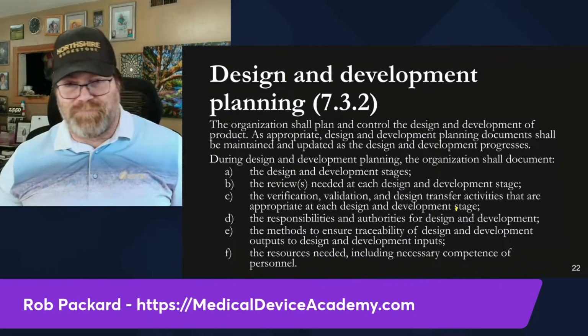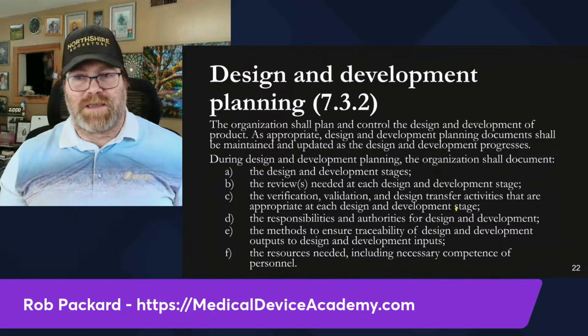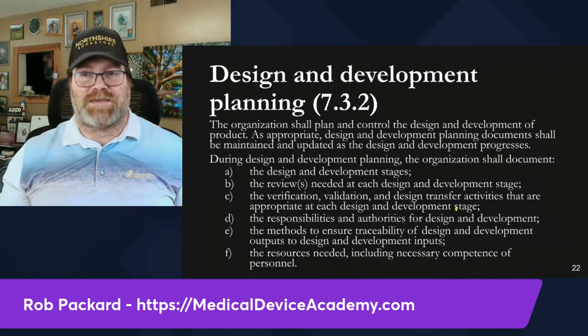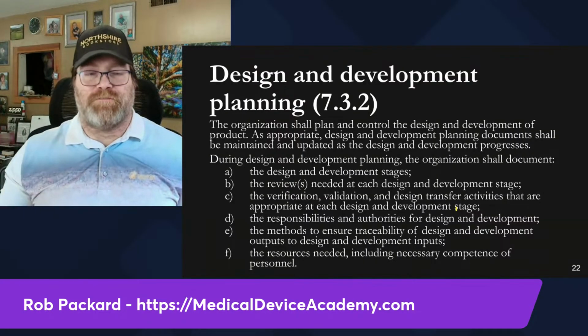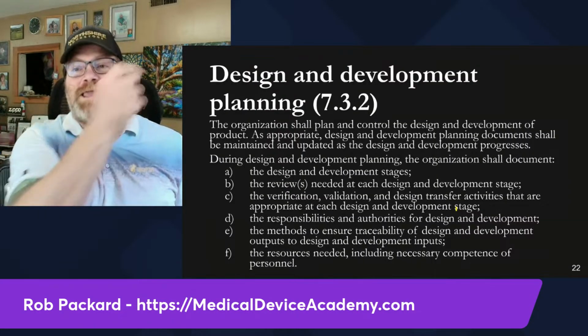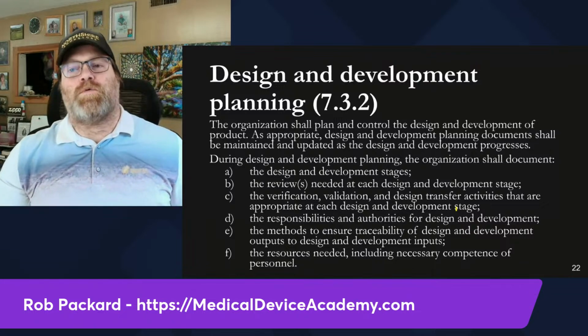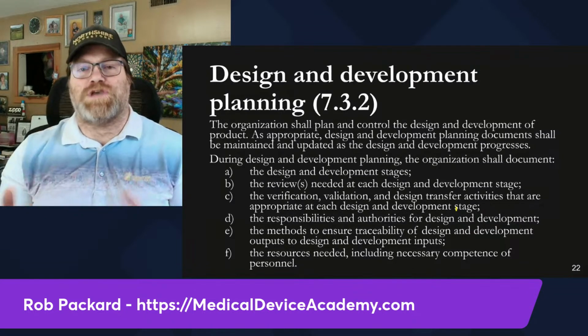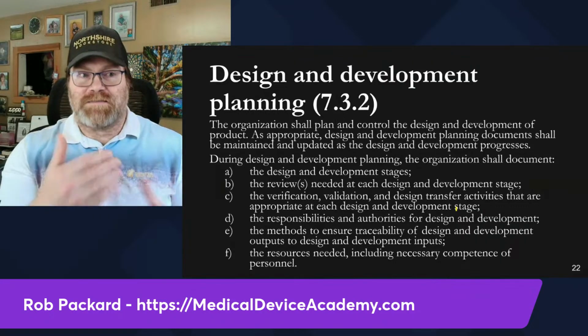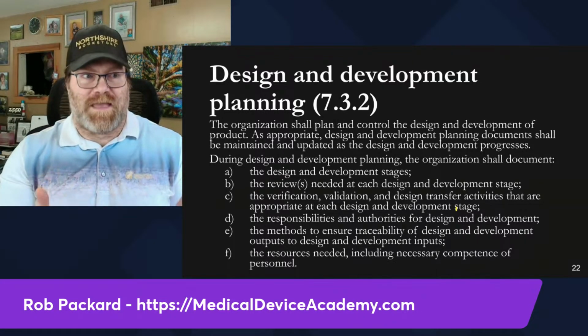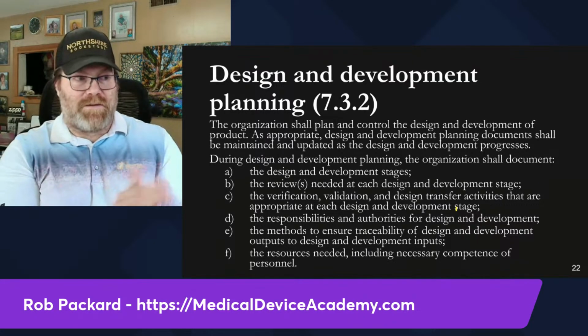When you're done the development and you've done all your verification testing, you've done all your validation testing, and you're in the middle of design transfer to production, that's when you do a 510K. So the plan came at the very beginning. And they're like, well, we didn't want to do a plan because we're going to change stuff. It says update it as the project progresses. It says that. Read it right here.